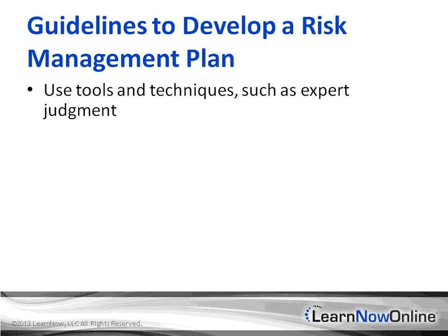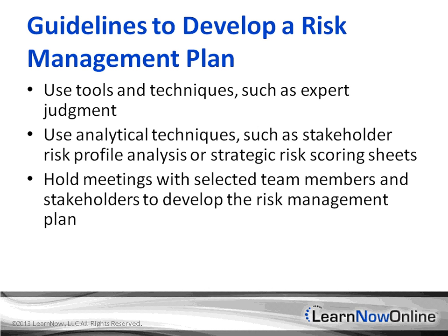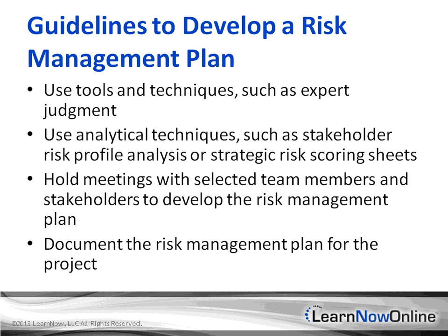Use tools and techniques such as expert judgment about risk from senior management, project stakeholders, project managers, subject matter experts, industry groups, and professional and technical associations. Use analytical techniques such as stakeholder risk profile analysis or strategic risk scoring sheets. Hold meetings with selected team members and stakeholders to develop the risk management plan. And document the risk management plan for the project.